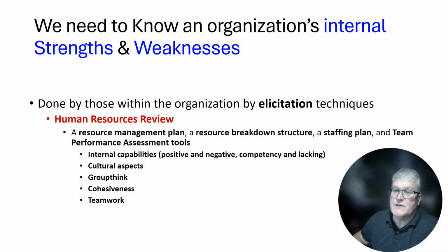Human resources review is an elicitation technique. Having a resource management plan, resource breakdown structure, staffing plan, and team performance assessment tools can determine internal capabilities, both good and bad, where you are capable, where you're lacking, and the cultural aspects of your organization towards the project, whether groupthink is predominant.